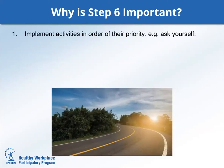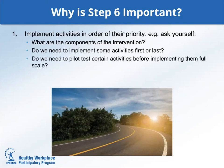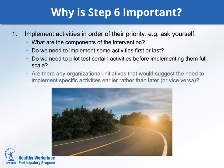One: implement activities in order of their priority. Ask yourself: what are the components of the intervention? Do we need to implement some activities first or last, maybe because of their ease or difficulty? Do we need to pilot test certain activities before implementing them full scale? Are there any organizational initiatives such as mergers, reorganizations, software changes, or relocation that would suggest the need to implement specific activities earlier or later? These questions may help to expedite the implementation progress.